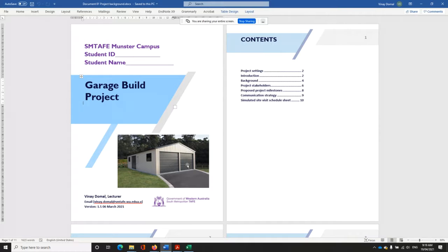So there is a lessons learned concept in all the portfolio work that you're going to do. You've got to write about your experiences, what you have done with the project, what your experience was in managing time, in managing risk, what plans you had for procurement, what plans you had for quality, right? Whether what you planned really worked out. What is the cost variance? What is the schedule variance? Can you capture that in the plan?